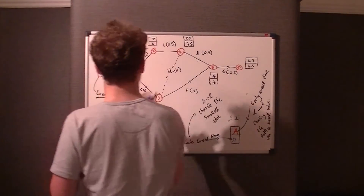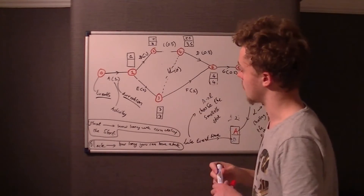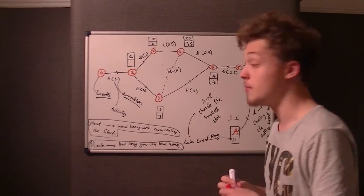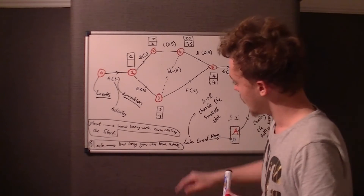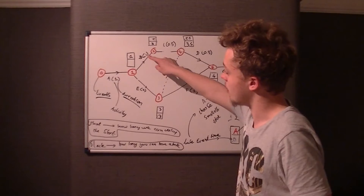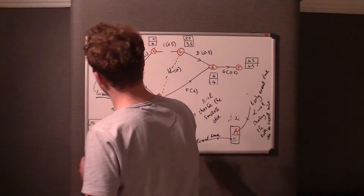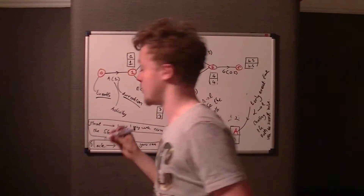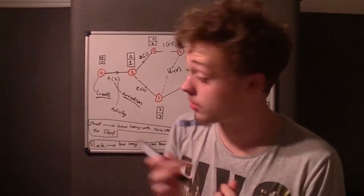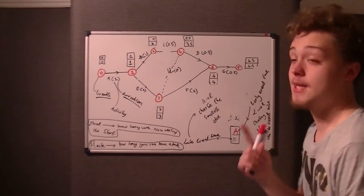Now at nodes two and three we both have Late Event Time of 3. To get to event one: from node three it's 3 minus 2 = 1, from node two it's 3 minus 2 = 1 as well — so the Late Event Time at one is 1. And at zero, both early and late times are zero.